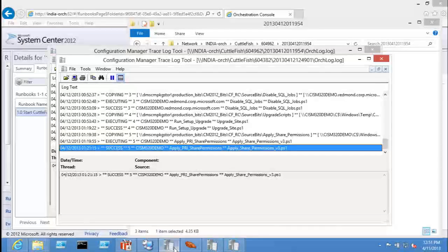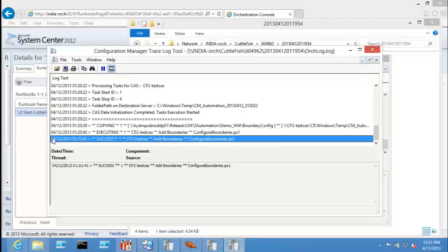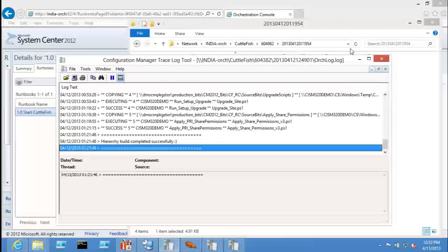We already have 20 or 25 scripts that we are going to share with you, so you can start with them as a learning and start using them. Also, there are 400-plus PowerShell cmdlets released as part of SP1, so it will be easy for you to start with those. We wrote lines of code which are not required anymore, so you can start much more easily using that out of the box. If I have to give you a time estimate of where you will end up, I would say 1 week for running the orchestrator and understanding how to start with a runbook, seeing online demos, and for a script, if you use it, probably 1 or 2 weeks.